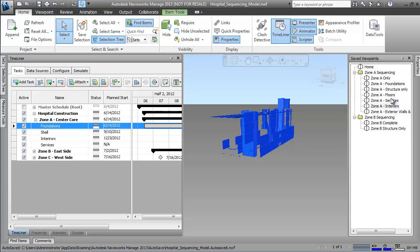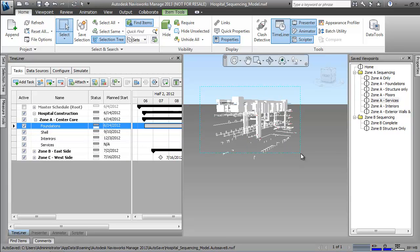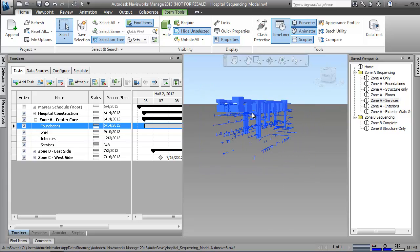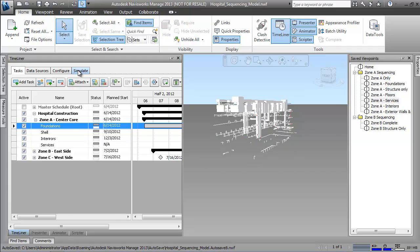Elements can be selected from a list, grouped together with selection sets, or in this case, simply highlighted on the screen and dragged and dropped to the appropriate task.